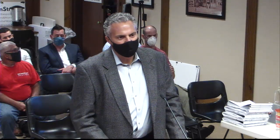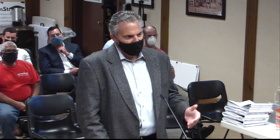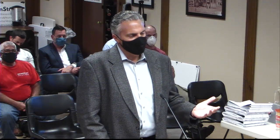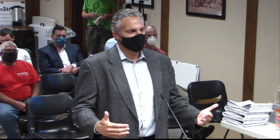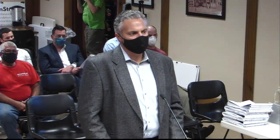The road that was mentioned is a temporary construction access road that was built to gain access to the lower level of the parking lot. They needed temporary access for construction vehicles to get to that lower level for some of the demo work. It's typical crushed stone and asphalt millings. It's all stable. Any down gradient areas were stabilized and protected with silt fence. There were no signs of erosion. So it was built to industry standards and is stable and operating as intended.